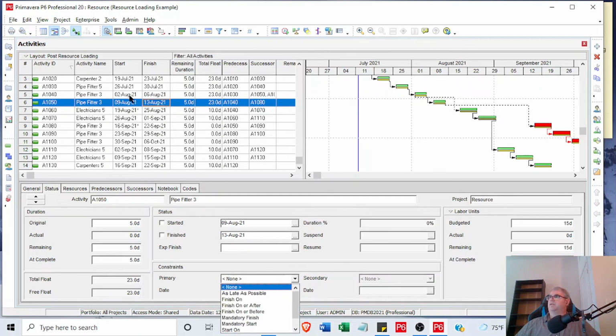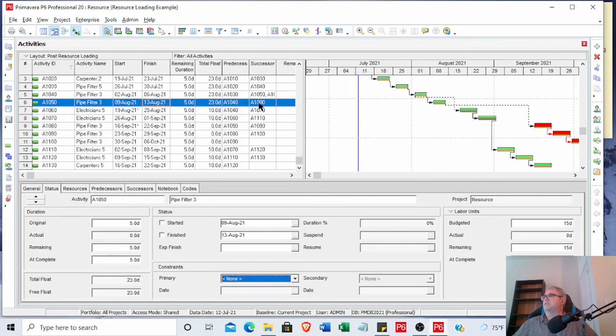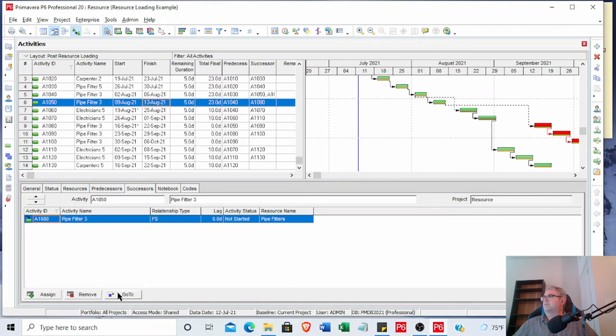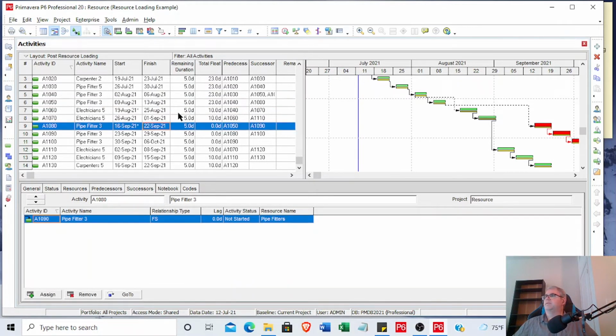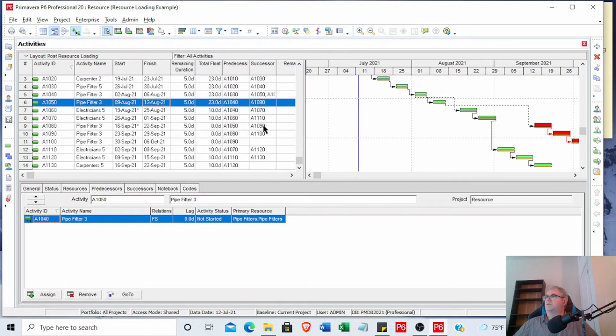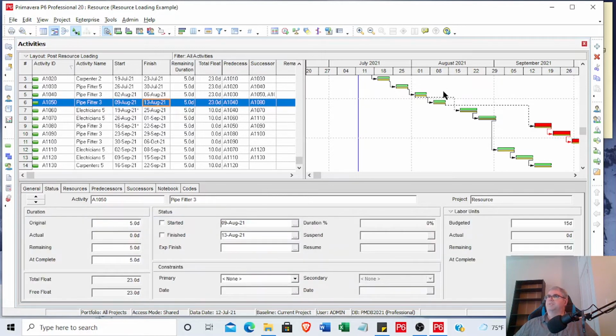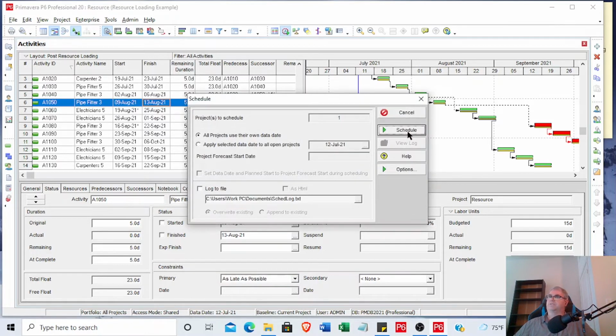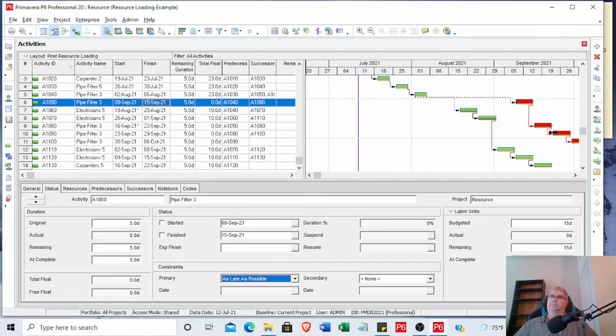So I'm going to say this 1050, I think it's 1050, 1050 leads to 1080. That's the one that I'm thinking of. Yeah, okay, that works. All right. So I'm going to attach an as late as possible to that one, and what's going to happen is it's going to move basically right in front of that, as far out as it possibly could. So I schedule it, and you'll see it moved out.